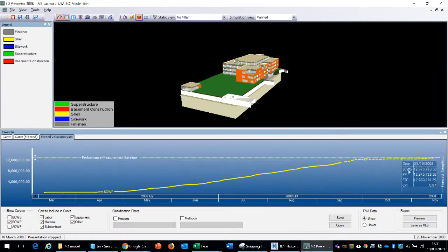And so if you could have an overview of this table here, you would see at the bottom, there's a cost performance index and schedule performance index. Again, these are two important terms when we talk about project monitoring. The cost performance index tells us how we are performing in terms of cost at any given point of time, and schedule performance index tells us how we are performing in terms of a schedule. So a rule of thumb that we have to remember is that 1 is the baseline, and anything more than 1 is very good news.